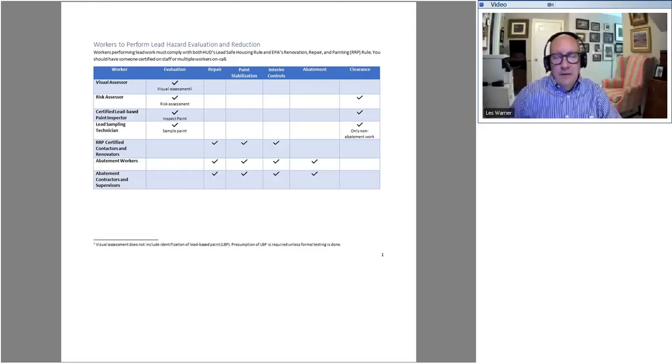containing that. I think that's part of the planning, to really assess: is it reasonable that we can not require any relocation on this? Also, maybe this can be contained and cleaned up within that 8-hour workday, and so we can also avoid relocation based on how we're going to be able to handle that.